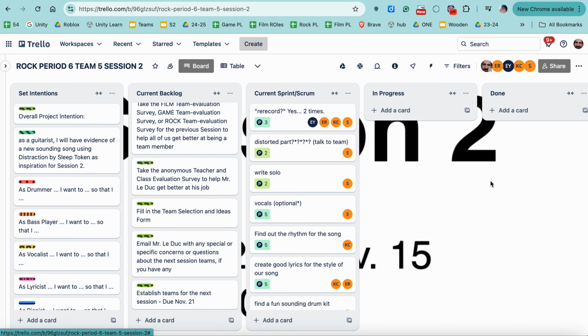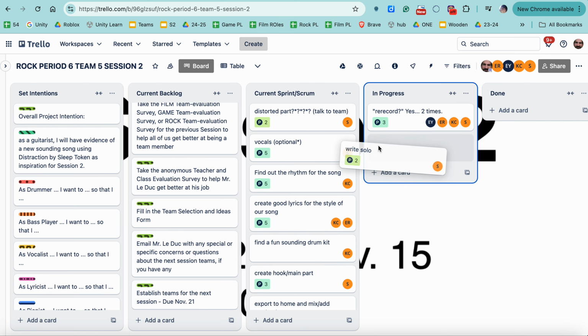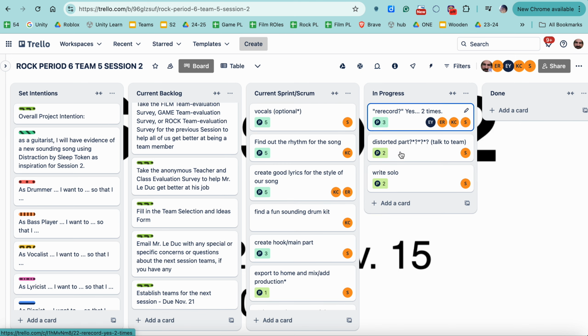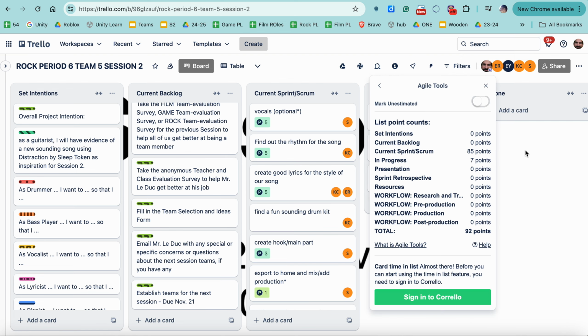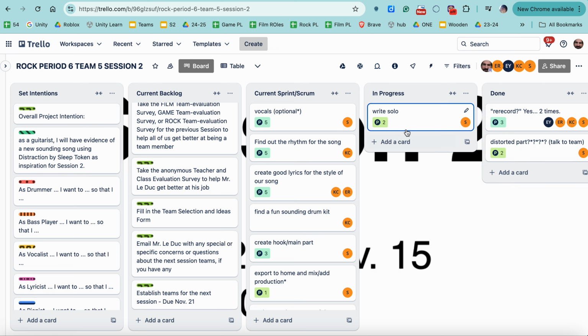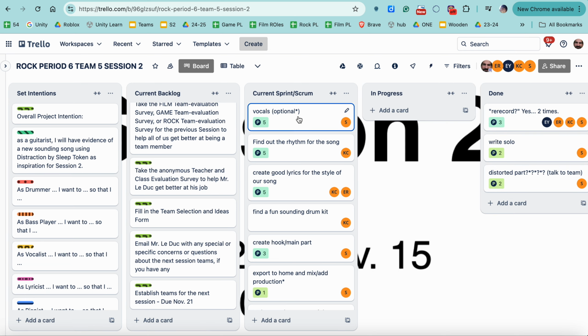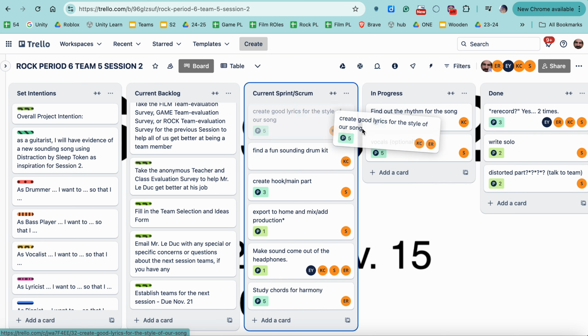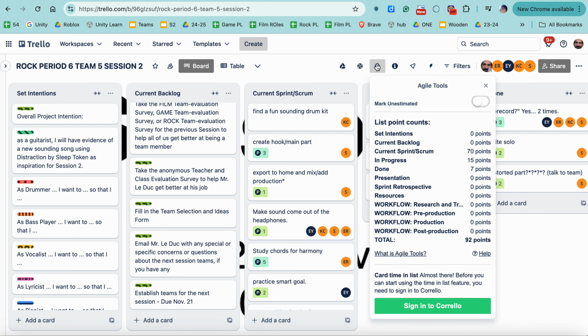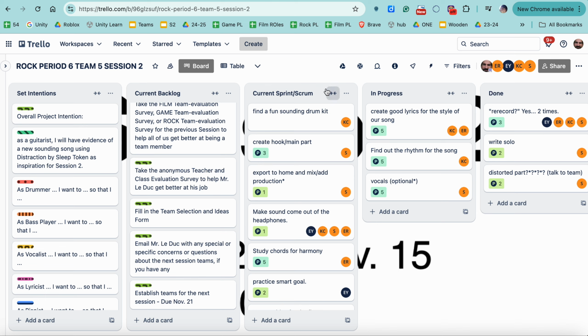Then every day, what you're doing is you're going to say, okay, today I think we can work on these. And you go about working, then the bell rings, you go away, you come back 23 hours, you click here, and you see your team says, yep, we got these done. Let's put them over here. And now we're going to load up some new ones. And you come up here and you look, now we're down to 70. So the next column to the right in the burn down chart will have 70 at the top. That's how this works.